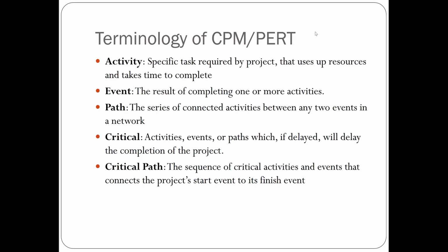And for CPM and the PERT, the terminologies are used the same. And when we mention an activity, it means it's a specific task that is required to be done if the project is to be carried out. And that specific task will use up resources and also will take time to complete. For example, when you create a design, you will do the research. The research would be one activity.